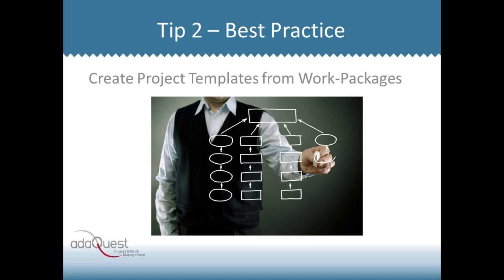Put those into a task library, kind of like a class library in programming. And then pull all of those together to build your next project, rather than finding a project and trying to tear it apart. Okay? This can be done in any collaboration system, SharePoint or any of the other competitors.